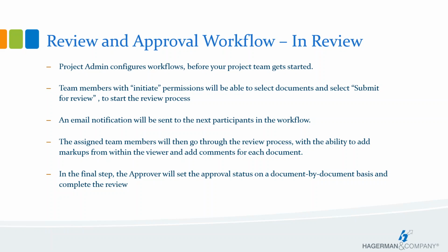Initiators can select from the list of project templates designated for each role in the select review template. The available project members for the review or approval phase are based on which project members were defined by the project admin for those chosen review templates.